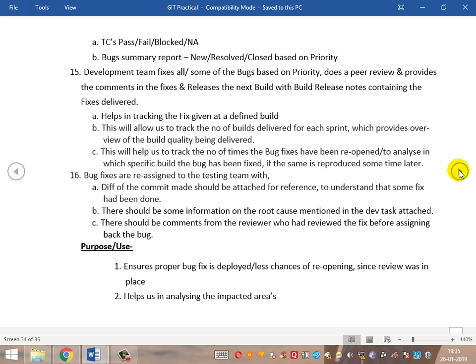Once this is done, the process continues. QA starts testing all the failed cases, retests the passed cases to ensure impacted areas, performs impact analysis, and picks up the test cases that need to be verified to ensure no major breakage occurred because of the developer fixes. They also ensure all blocked cases have been executed. The process continues with Build 1, Build 2, Build 3, and so on.